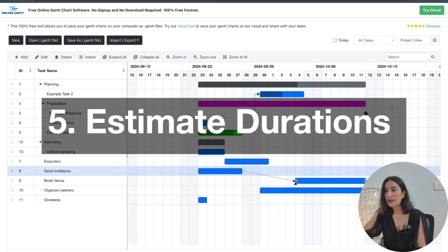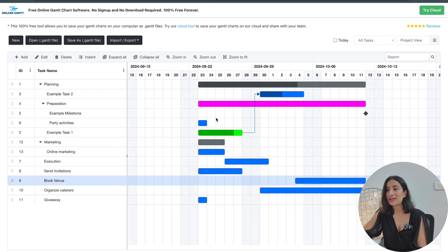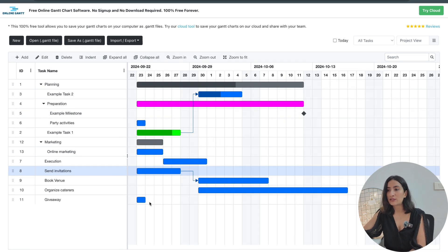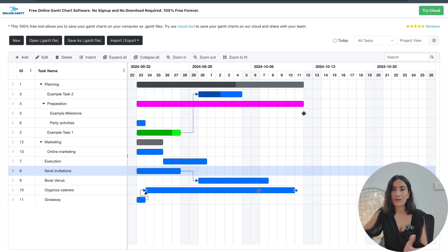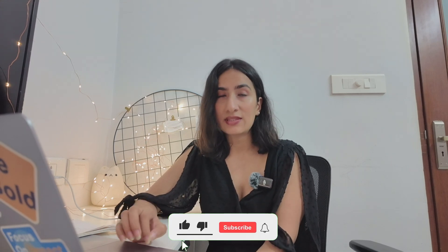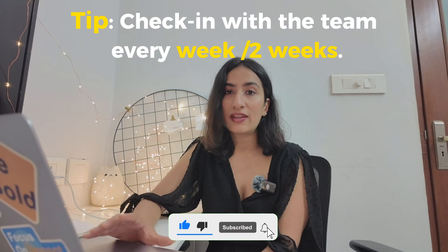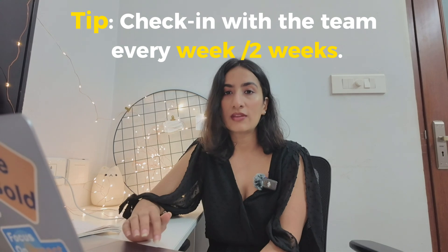When you know the activities, the timeline sequence, and the resources, you're able to estimate the duration of each activity. Now that you have the estimations, you can plot them in the Gantt chart and give each a starting and end date. Remember these are usually tentative, so you typically go by the week or even by the month depending on how big the project is. Finally, you create a schedule — on a certain week you know what you're focusing on, what's happening in parallel, and you can communicate all of that to your teams. Check in on the Gantt chart every day, week, or two weeks depending on how long the project runs.